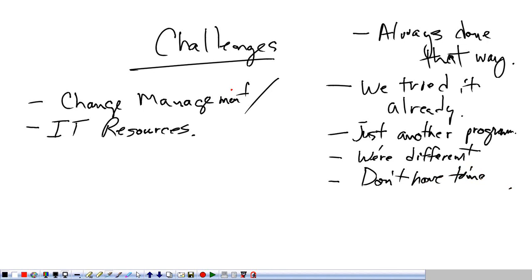Number two, if you do foresee IT being a key linchpin in the improvement, it's best to start having the conversations with what we're later going to call our champion early on. So at your company, that's alerting Carlos to, hey, we see some IT changes on the horizon for this. Let's make sure it gets into the next cycle. I don't know if you guys do quarterly or monthly cycles or biannually, but whatever that change cycle is. So that's a big one to bring in. Yeah, it is, and he's already aware of it.